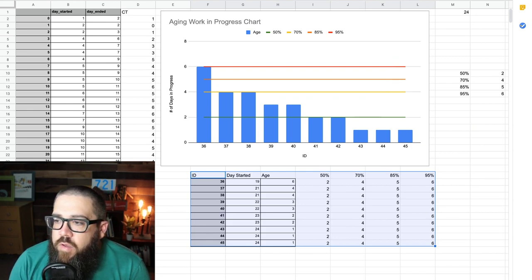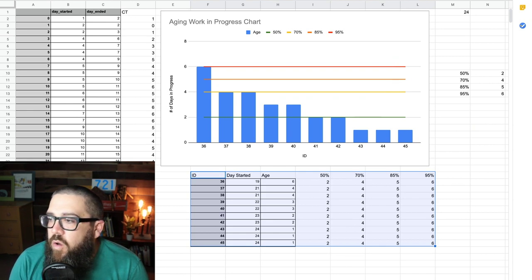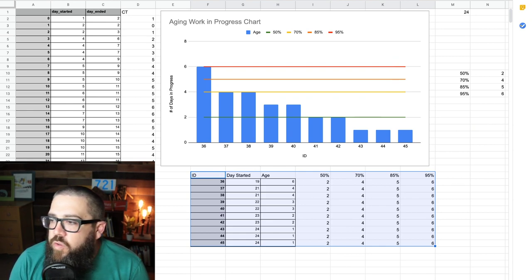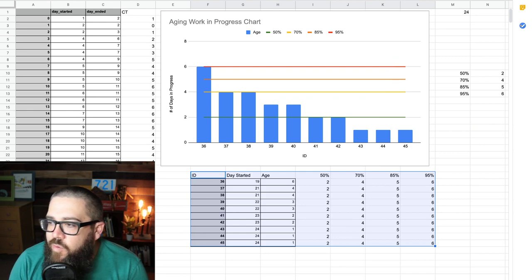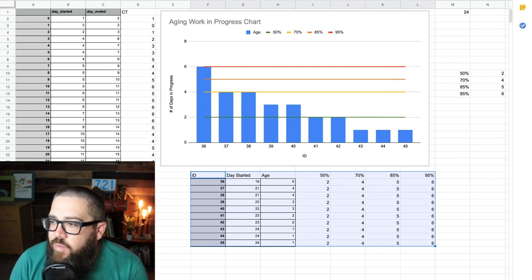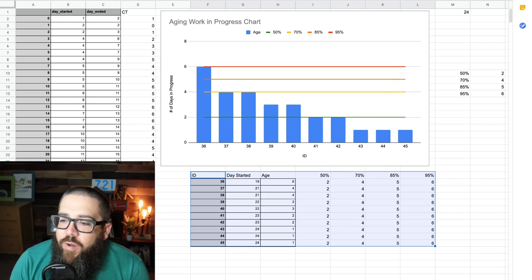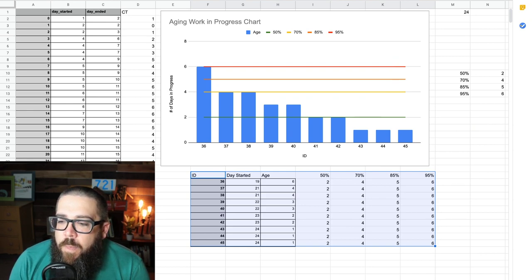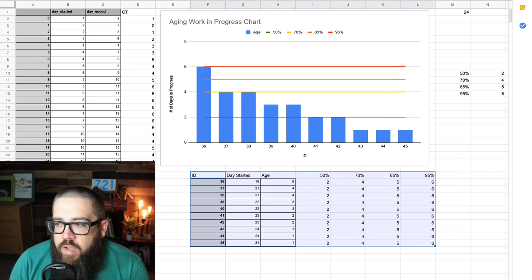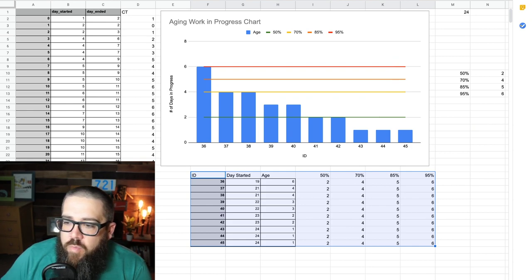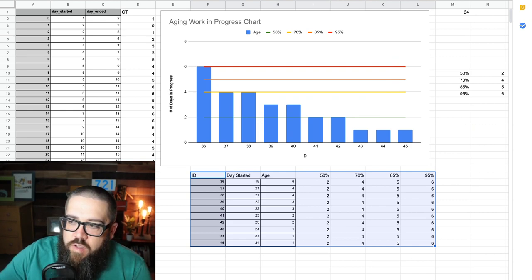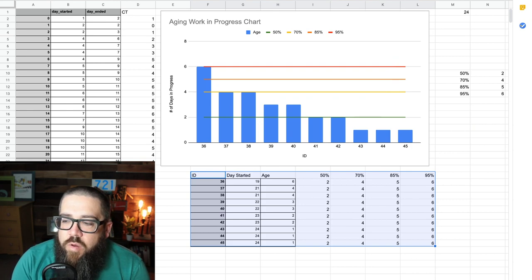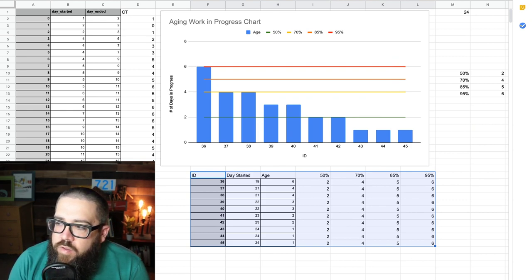And you don't have to do all four of them. If you only do one, do the 85th. If you only do one and two, do the 85th and 95th. You get the idea here. And I just add those as lines. And the way I add them as lines on the graph is you can just see the numbers going down on all the items. Really simple chart to make. Not too hard.